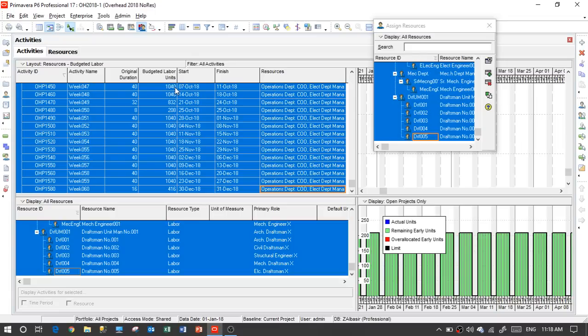Simple. And what is the overhead cost here per hour, for example? If I see resource number one, the overhead per hour is the calculated cost for all entitlements, including salaries, benefits, car, health insurance, fees, accommodation, whatever cost there was, calculated and divided by the total hours in the year, which for 2018 is 2,088 hours in this working year without the public holidays because they are paid, okay?